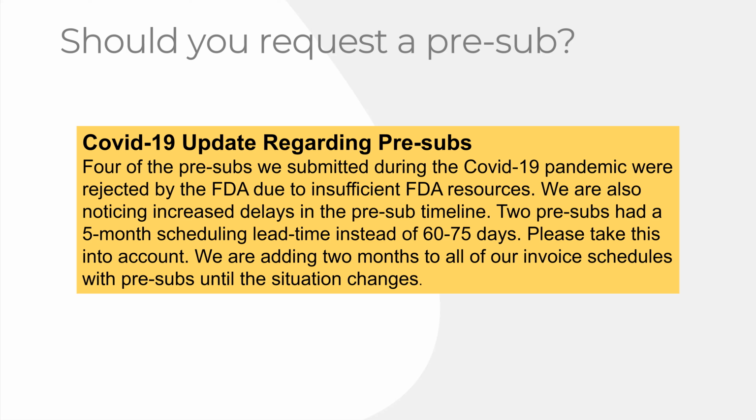And I said, not only did you wait to involve me when I could have given you that information, but the person that actually is going to be buying the product isn't even invited to this meeting. So the buyer, our supply chain manager, isn't in this meeting, doesn't know that you need it. And you expect him to deliver it in 4 weeks, but he doesn't even know about it. Why didn't you invite him to the meeting?